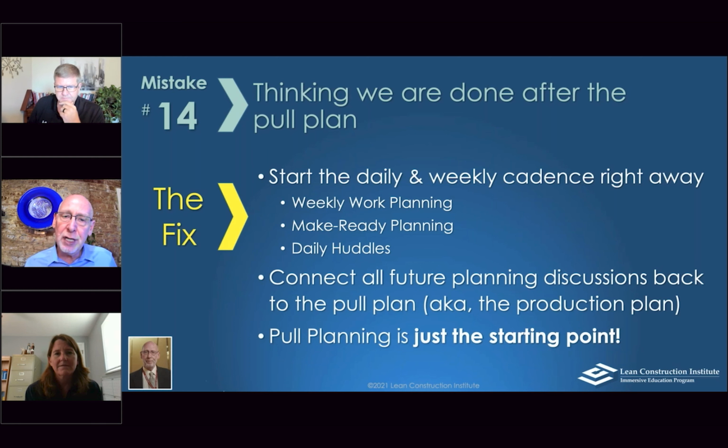And that reminds me of another tangent, Julie, which is why big rooms on the job site really make a huge difference. You shouldn't have your daily huddle in a separate space from where you have your other major planning events. They should all be in the same room so the same information is on the board. Sometimes, on a more difficult job site, or when the GC uses one of its offices, we would bring copies of pull planning that weren't available in the room, but it's really critical. The more information you have in front of you, the better you can manage it, is all I'm trying to say. Agreed. All right, we'll move on.